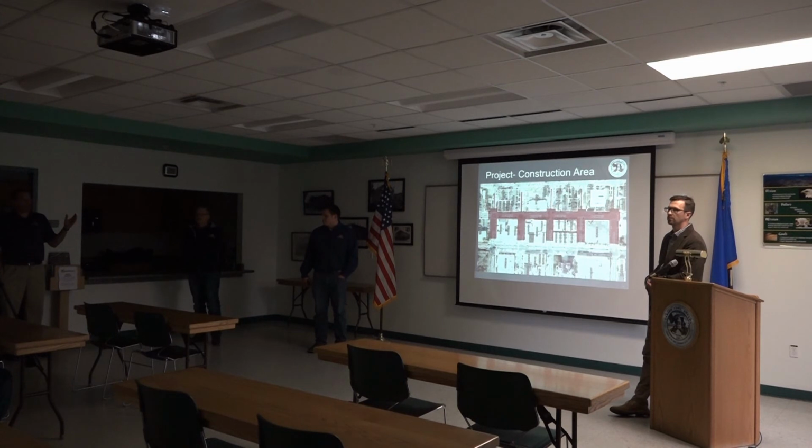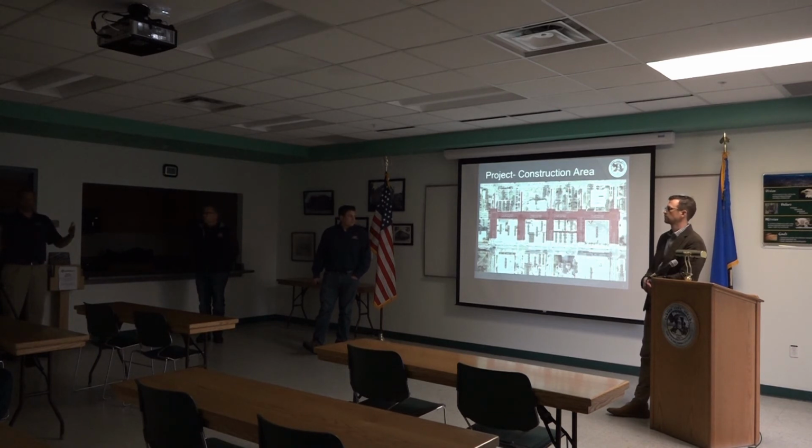Gotcha. The big unknown for us that could really hang us up is the underground utilities. Absolutely. Once we get through the underground, if there's a hang up, we work around it. If it's a 15 by 10-foot area, and we're waiting on Mike to iron out whatever we came across that we didn't expect, we jump ahead and keep going and figure out a way to tie that in temporarily as far as sidewalks and curb and gutter.